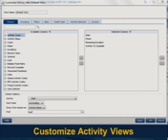Okay, so looking at the screenshot, the question was what's the difference between global activity codes, EPS activity codes, and project activity codes. Activity codes are basically attributes that you can assign to an activity within a schedule. One of the activity codes that you guys use here is the activity owned by office code to say which group is actually responsible for updating an activity. So that's what an activity code is in general.